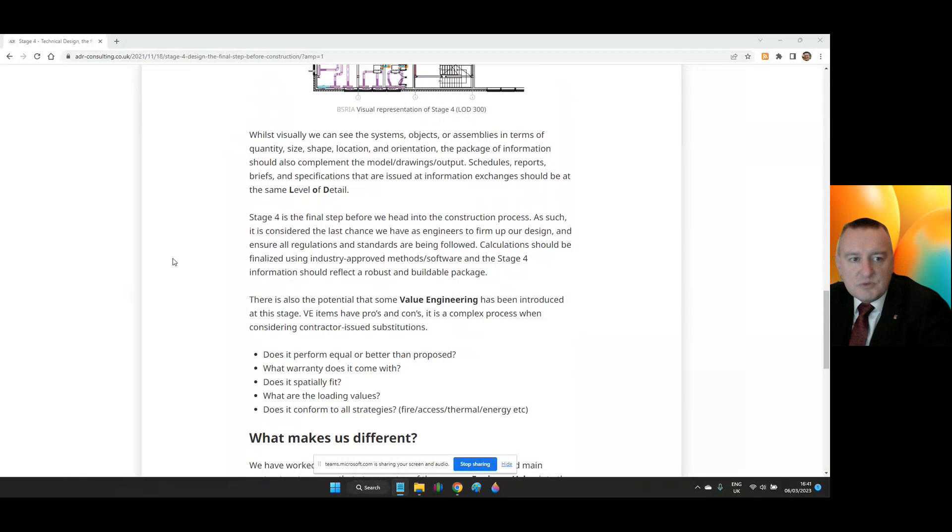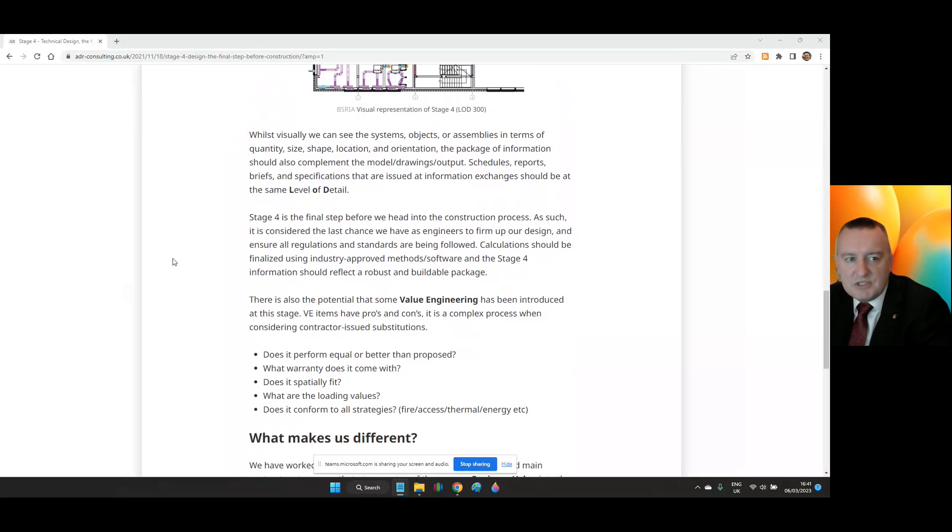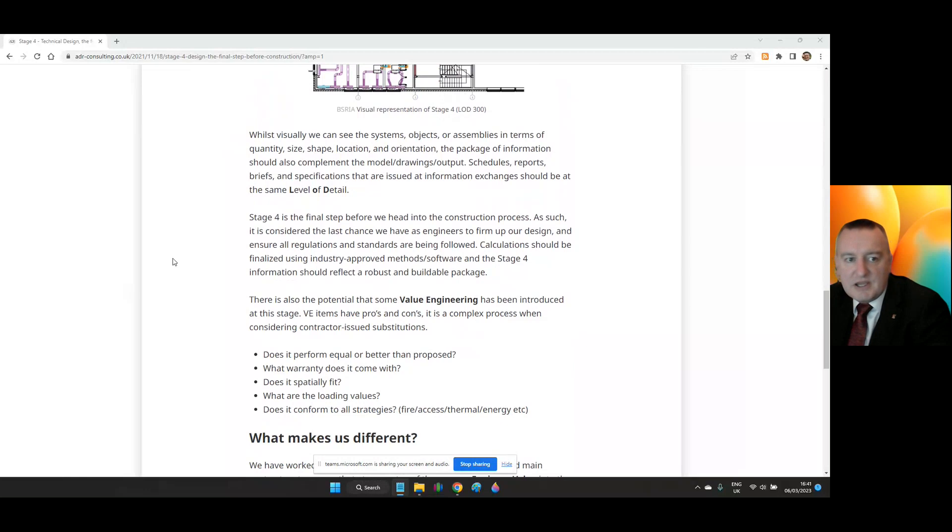There is also the potential for some value engineering to be introduced at this stage. VE items have pros and cons. It's a complex process when considering contractor-issued substitutions. Does it perform equally or better than proposed? What warranty does it come with? Does it fit spatially? What are the loading values? Does it conform to all strategies for fire, access, thermal, energy, etc.? What makes it different?